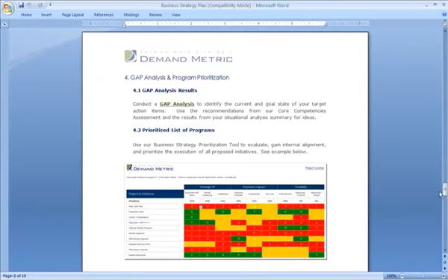So a gap analysis would be to look at a target item, identify its current state, envision a goal state for that item, and then work on the action items to resolve that gap and set a timeline for that. So for instance, you might have no CRM system, and your vision is to have something that all of your employees can access and use. That might be something that you need to develop a project plan around.